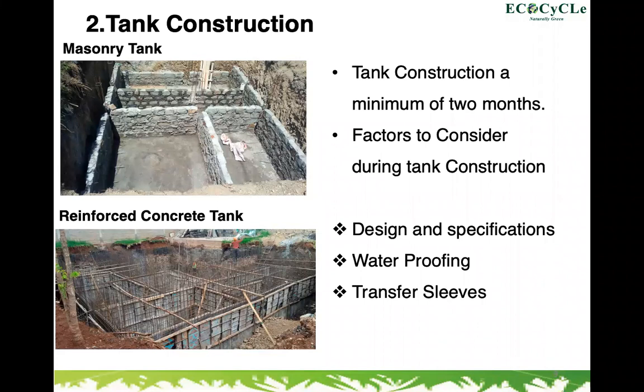So what happens is a minimum tank construction usually is 2 months, depending on the size of the system. You cannot compare the tank of a small home and the tank like the one we were doing installation for 500 people. There's usually a significant difference in the lead times of the tank constructions.